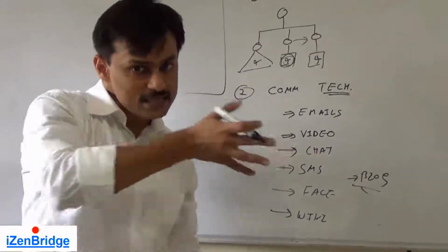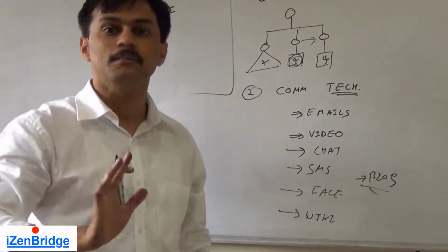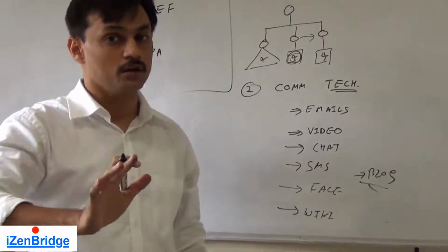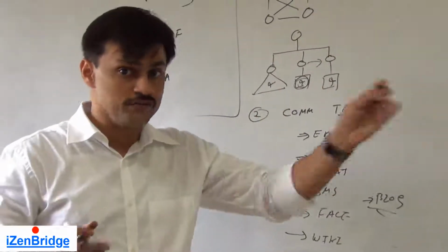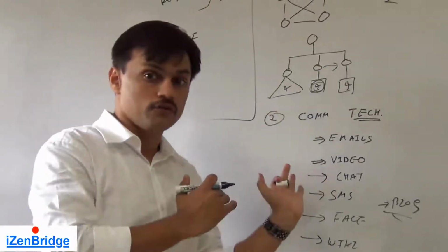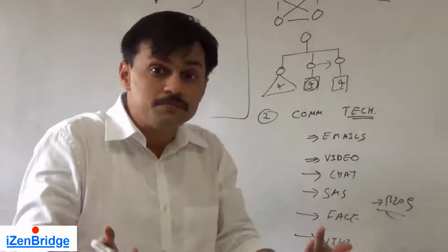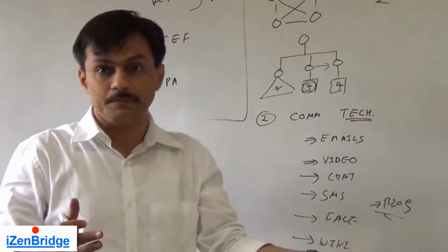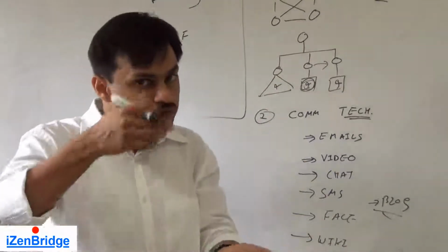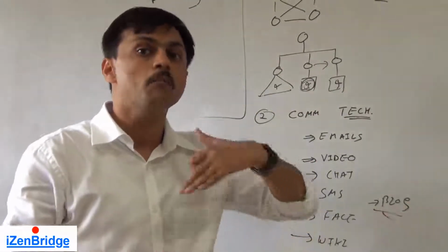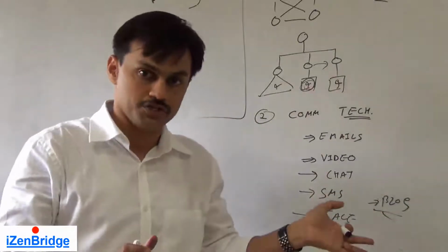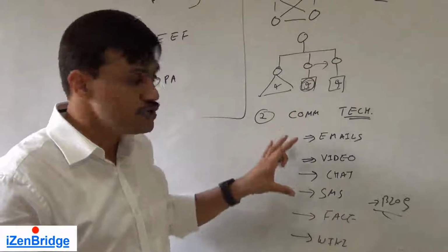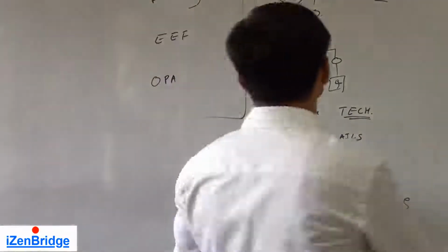Second, on the basis of their characteristics. For example, face-to-face communication is always preferred, but it cannot be done because of a geographical difference. You may go to a video conference. A video conference may not be possible if the time zone is too different, or the person is not available. Then you may fall back on video chatting or video blogging. If that is also not possible, you say okay, follow an email communication. So you need to identify which one fits where.